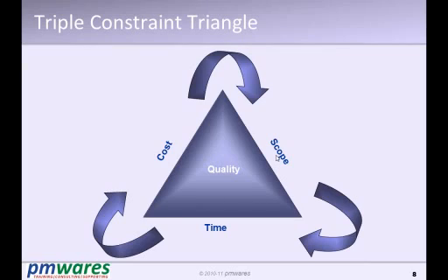In that case, you need to bring the time inside and quality outside, and say that I will compromise on the quality, which is compromisable, because time cannot be compromised. If you do that, you will be better planned and will manage the quality far better than leaving it non-negotiable and then negotiated.